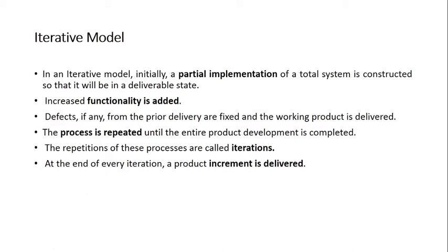So we can ask the customer, since I have a limited budget as of now, to deliver only those modules which I require immediately in the given timeline. For example, I can say I just have a budget of 2 lakhs as of now, though the overall software would take 10 lakhs. So I'll ask the customer to deliver only, say, 3 modules which can be easily developed in 2 lakhs right now.